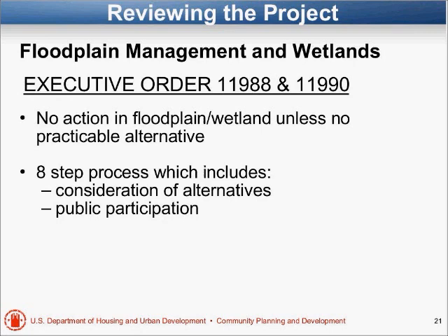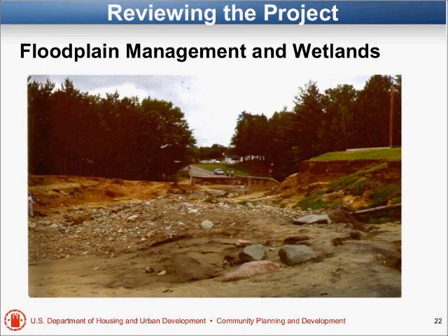Another thing that we look at is floodplains. There's a separate Flood Disaster Protection Act of '73. There are also executive orders on floodplains and wetlands that say don't take any action in a floodplain or wetland unless there's no practical alternative, and prescribe an 8-step process. What does that mean for you? It doesn't mean you can't build in a floodplain or wetland. It means you've got to proceed very carefully.